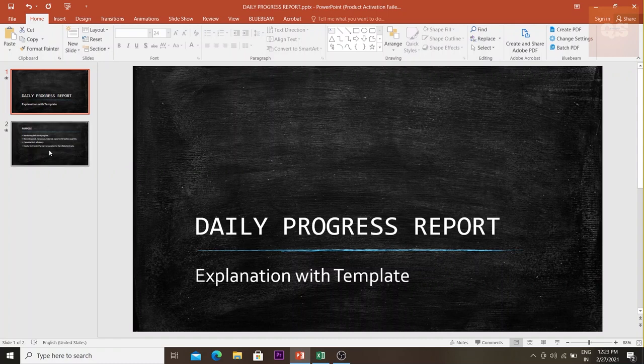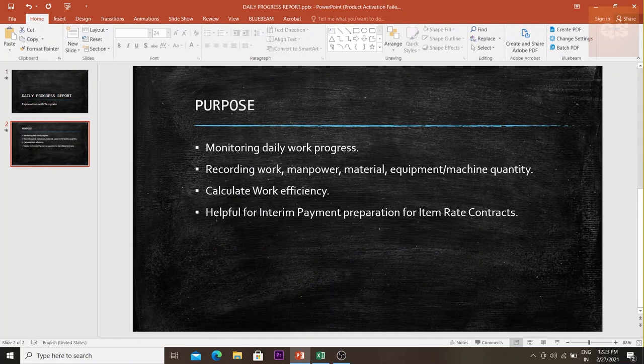Let's understand what DPR is. It is mainly used to monitor the daily work progress. While monitoring, we are able to record the work details, the manpower used to carry out that particular work, the materials used, and the equipment and machines used. This is the main use of a DPR. It can also be used to calculate work efficiency.